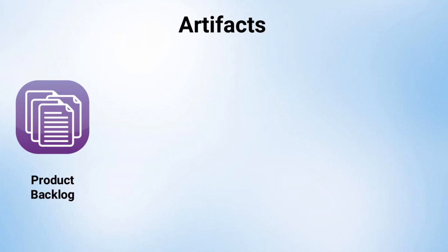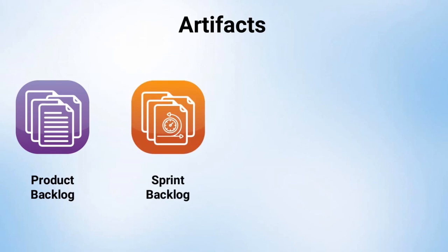When you are ready to plan a sprint, the list of issues to be completed during the sprint is called the sprint backlog. The sprint backlog includes a plan on how to accomplish the work of the issues. This means that before starting the actual sprint, more details are added to the issues in the sprint backlog. Those details describe how the work on the issues will be done.